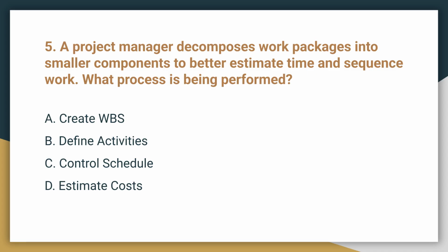Question 5. A project manager decomposes work packages into smaller components to better estimate time and sequence work. What process is being performed? The correct answer is B, define activities. This process breaks down work packages into the necessary activities for scheduling and estimation.